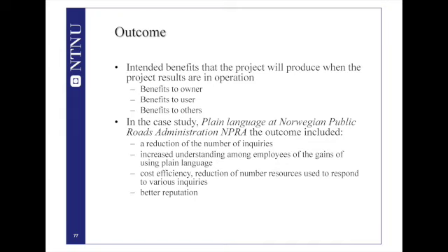Here come the benefits. Here comes what we gain. These are the things you do your project in order to gain. You need to devise your project so that you attain these gains. Otherwise, you have no means to say that your project achieved its main purpose. For instance, if you notice that the number of inquiries sent by the end users was reduced, then the letters are more understandable.